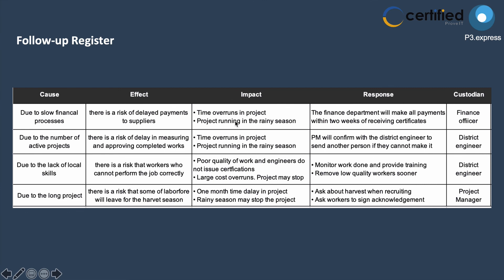Second, due to the number of active projects, there is a risk of delay in measuring and approving completed works — getting engineers to sign things off — which again could cause time overruns into the rainy season. The response is that the project manager will confirm with the district engineer to send a substitute if they cannot attend, with the district engineer as custodian.